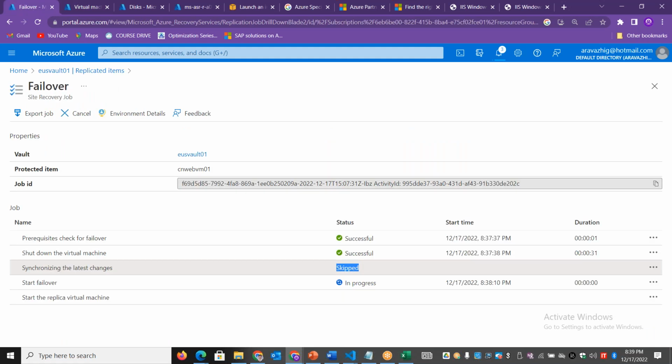Okay, we need some patience. Part of migration, if you are working in the weekend, you might have to wait the entire day also. Sometimes if the VM is huge, the migration will go for the entire weekend. If the VM is a database VM or has some terabytes of content, then you need a lot of patience. Here, we are just migrating 100 GB content. In real time, you will have 1 TB, 2 TB. So you have to think that you need that much amount of time and patience to watch the things.